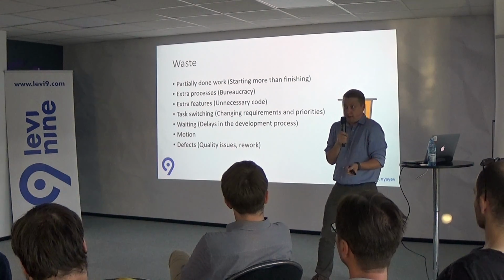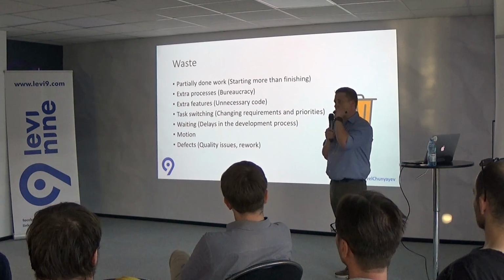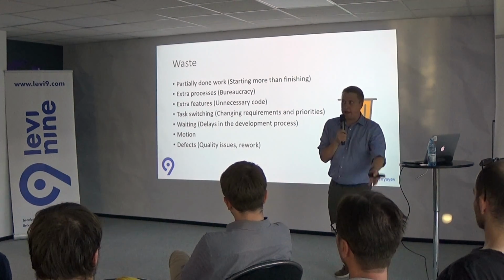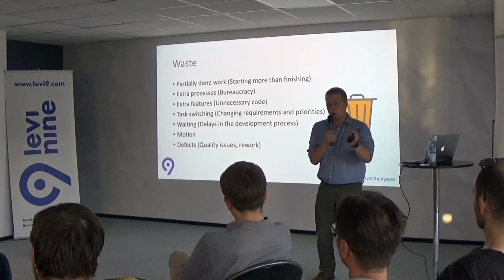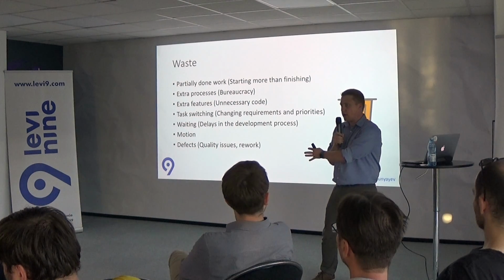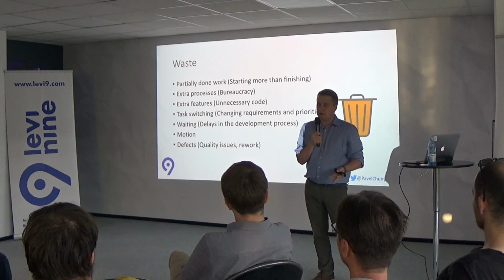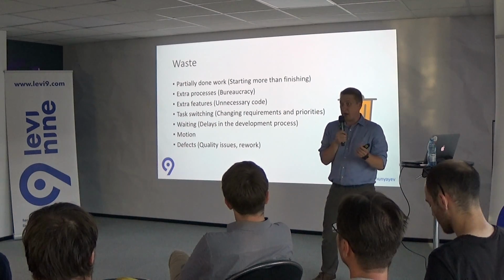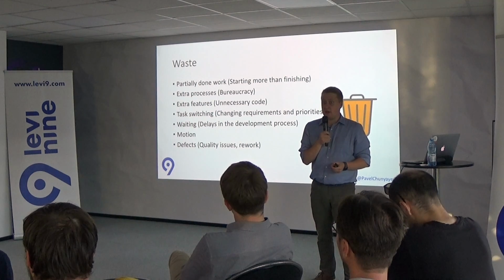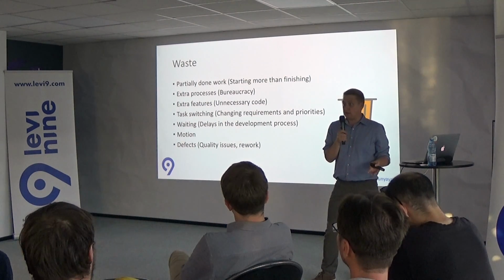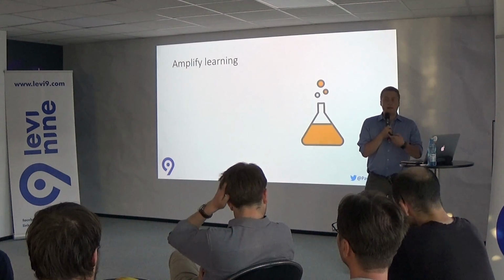In most cases, if it's a bug, it's a problem, why is it not fixed immediately? Why do we need to put it in Jira, then plan it, discuss it, put it into a sprint, and go through the whole overhead of administrative work to fix something that was found? Why not fix it immediately? Finding the bug provides no value to anyone. Fixing the bugs provides value. And we are postponing this to later. We shouldn't like this.